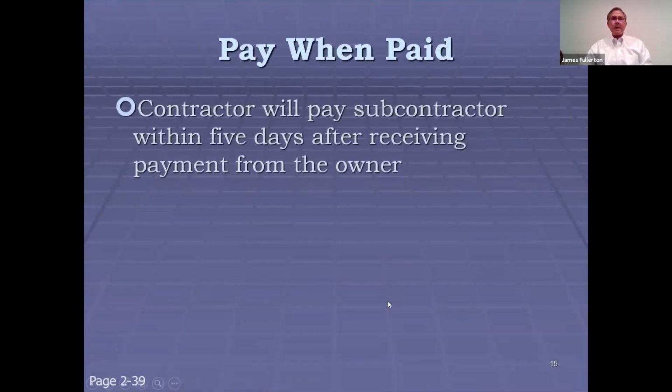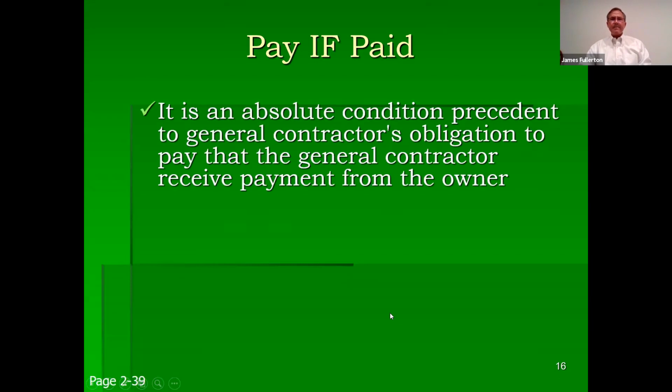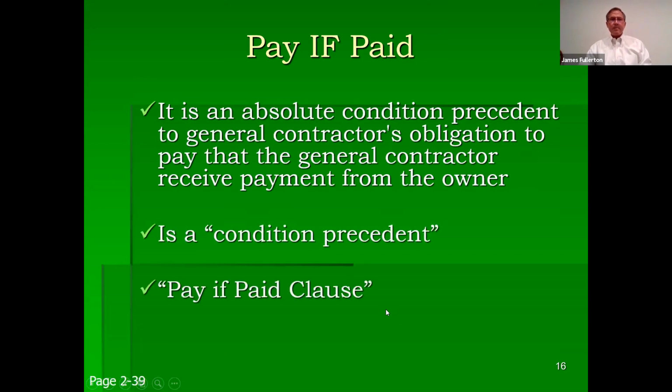All right. That is a timing clause. Pay when paid is a timing clause. AIA documents contain that phraseology. Pay if paid, condition precedent, and that's what we call a pay if paid clause.